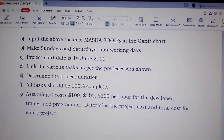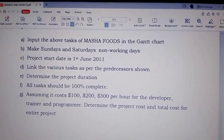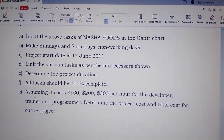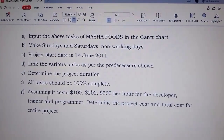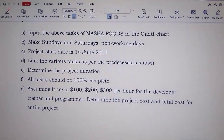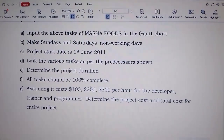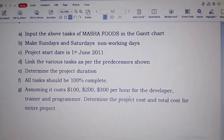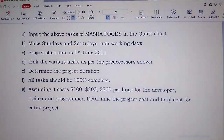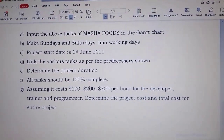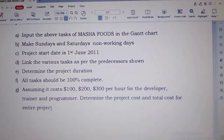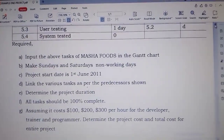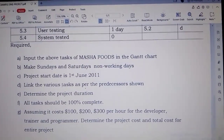Determine the project duration. All tasks should be 100% complete. Then the last part is that assuming it costs $100, $200, $300 per hour for the developer, trainer, and programmer — determine the project cost and the total cost for the entire project. So that is what they want us to do for Marsha Foods.